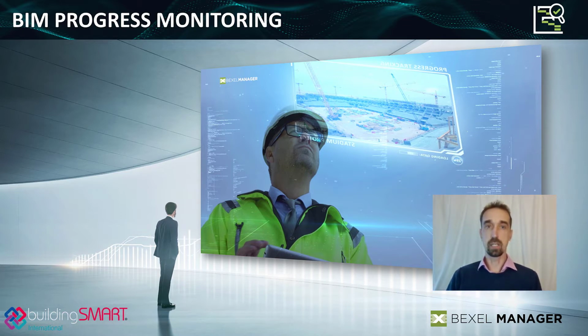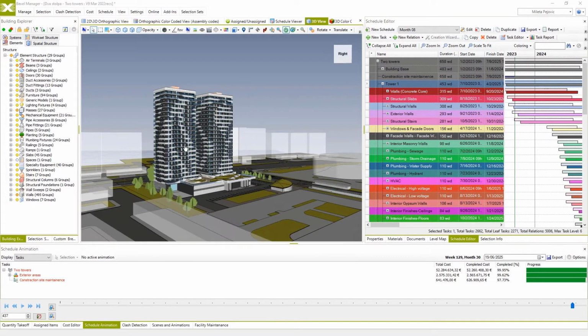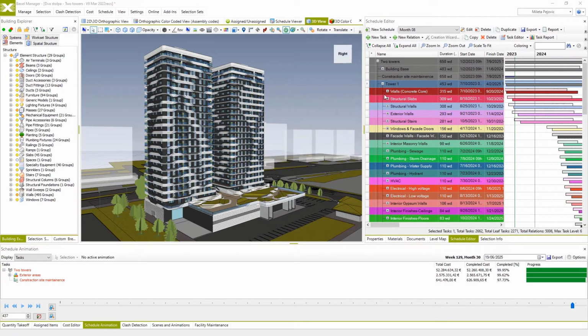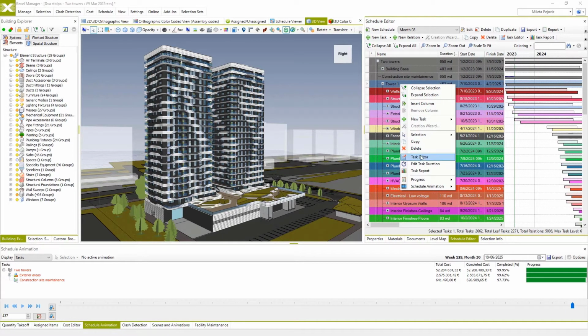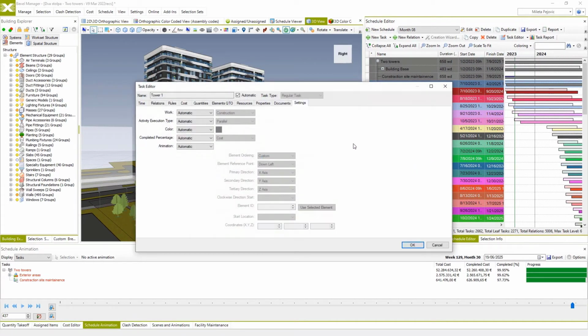Since everything is integrated and interactive, all cost and quantity information are reflected in our schedule, and all BIM elements are related to each task and its cost estimation. This way, before the construction on the site even starts, we'll have the entire cash flow and resources information needed